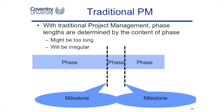In this video clip we're going to look at agile project management and compare it directly with traditional project management. In traditional project management, projects might be broken down into phases separated by key milestones. These phases might be of different lengths — irregular — a long phase, a short phase, and a longer phase. The phases could be three months, two months, one month, but they're separated by important events where management approves the progress of the project to the next step.